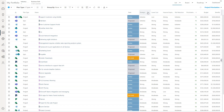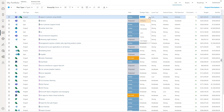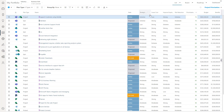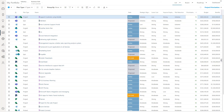For prioritization, you can have prioritization views that allow you to look at projects from a prioritization perspective with whatever mechanism you want. For example, business drivers like strategic alignment, lower cost, improve employee retention, and risk reduction all contribute to a calculated prioritization score. What you select in the gradations — from extreme alignment down to no alignment — contributes to a weighted score that gives a prioritization based on your model.